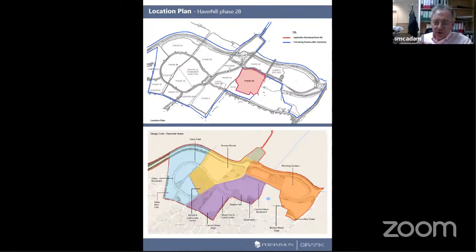Yeah, as I say, in an effort to restore confidence for local residents, we've maybe been a bit over ambitious in putting fences up just now. And the idea was to give you comfort that nothing was going to happen to these hedges. And as part of the method statement which has been submitted, any work that is due to take place within the protected areas will be subject to a consultant arboriculturist coming out while any works are taking place.